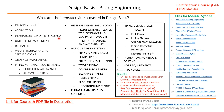The unit of measurement — SI unit, metric unit, or whatever is used — must be mentioned in the design basis. Design life is very important: we must specify for how long we are designing the plant. All codes, standards, and specifications to be used in the project must be listed, along with the order of precedence.